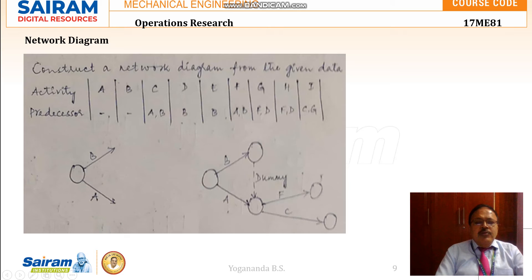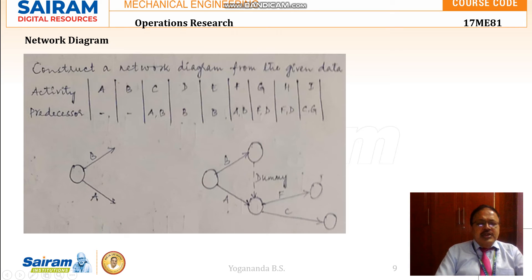We have the activities from A to I: A, B, C, D, E, F, G, H, and I. Predecessor means the activity which comes before. A and B are the activities having no predecessor — we don't have any activities before them. That means A and B are the two beginners, the activities with which the project begins, and they start simultaneously.